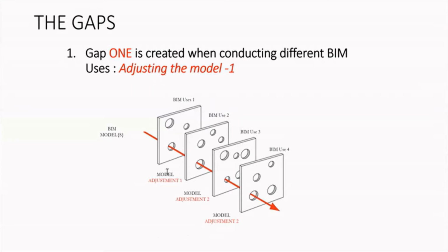So now, let's say he made an adjustment, and it's not in the native Revit file. So now he has informed the architect that he has done some adjustments, which are not compatible with Revit. That means he did some adjustments, but the architect can't use them. So the architect has to look at the adjustments and then remodel in Revit and then resend to the energy modeler. So this is rework, back and forth. This could lead to data loss, time wasting, more cost, and it's not efficient at all.